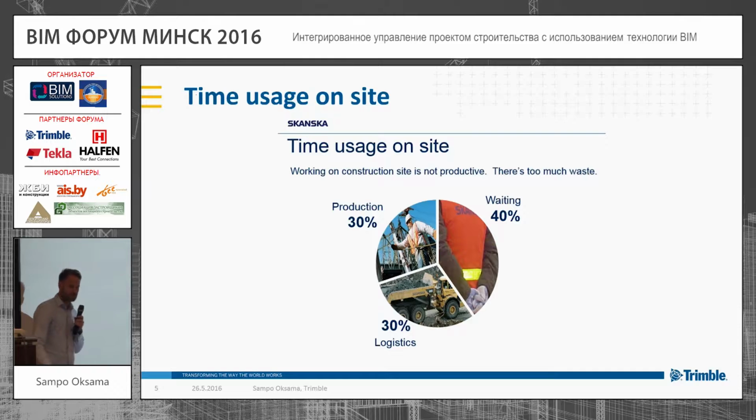And if we look a little bit more detailed and concentrate on the construction side, this is Skanska Finland research about how time is used on site. We can see from this chart that only 30% of what they're doing on site is actually productive work. They are waiting for materials, getting information from the documents, or moving materials or tools to the right location. So only 30% of the time that they're working, they're really working.